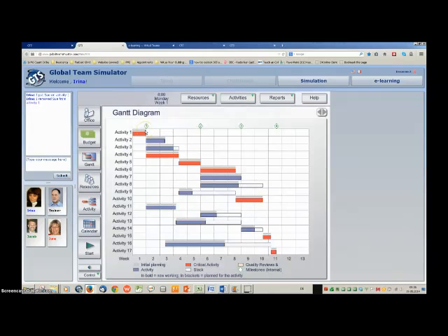The program has already been prepared, everything has been assigned except the people, so how long things take has been worked out. If you look closely, you'll see a grey bar. That's the plan, if you like, the baseline, what's been agreed. And then the red is clearly the critical path, and the blue is non-critical activities. And those will change dynamically as the project moves forward.